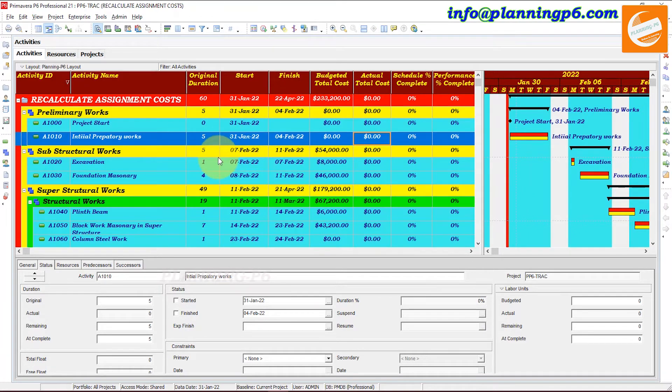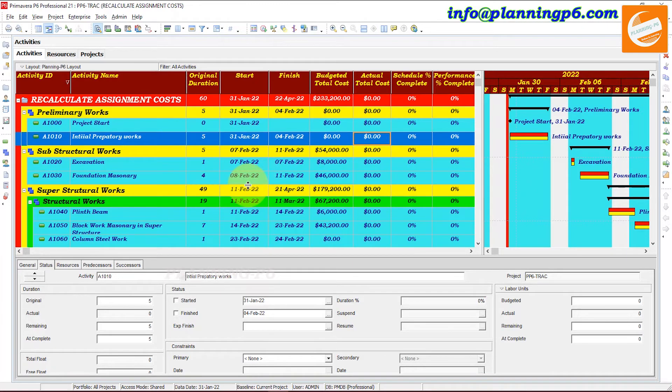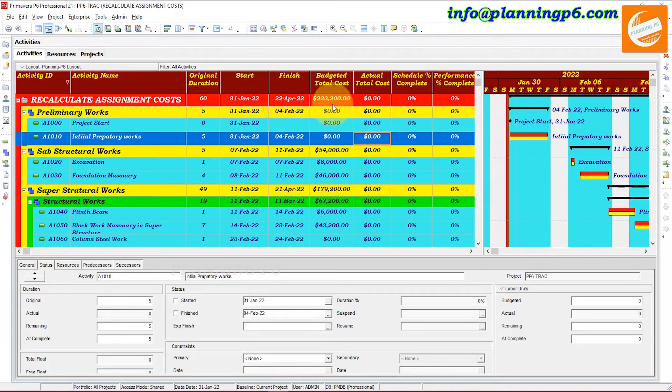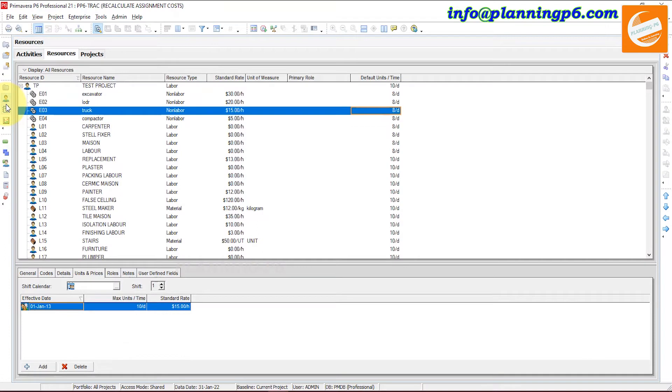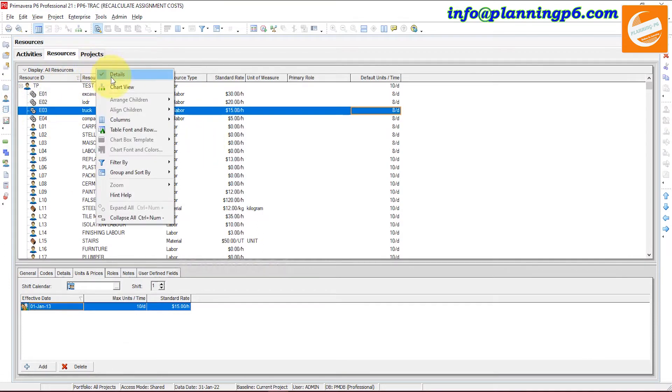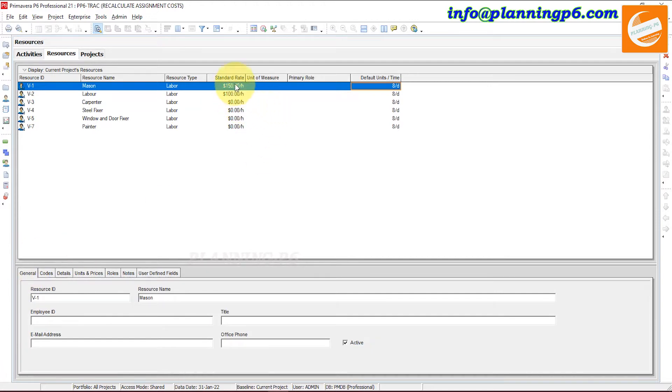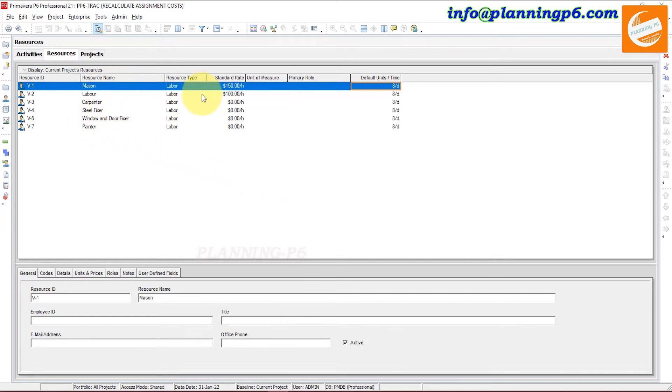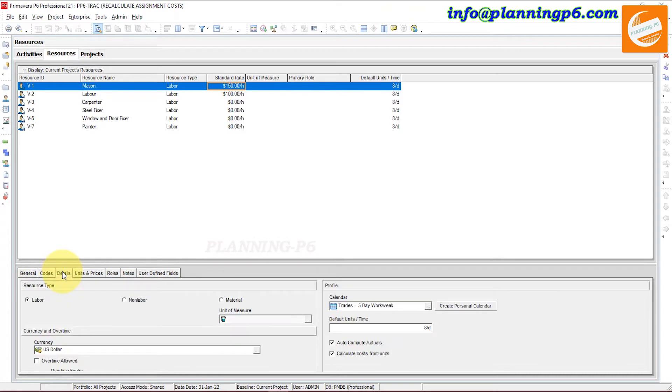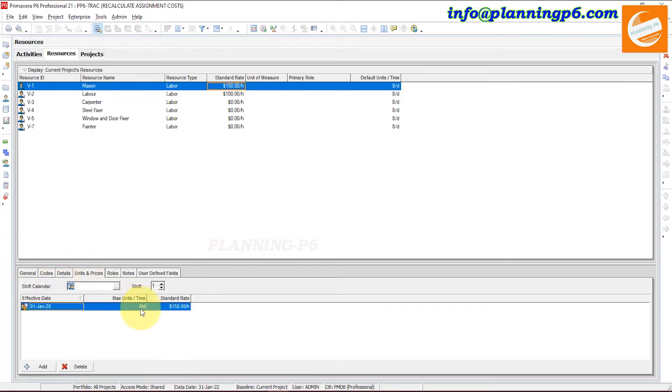If you have seen here, we will go and see the resources for some activities, and then for the resources you will see focus on the total budget cost. Open the resources here. First of all, we will filter the resources for only this project which I have already opened here. There are two or three options which are standard rate and default units per time per day. So here for the mason, carpenter, we just change two or three. You can see the mason, and here in the details the unit prices. You can see maximum unit is how much, is eight hours per day.